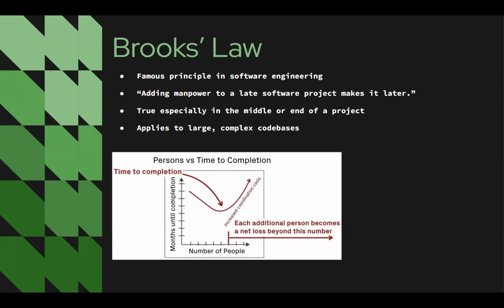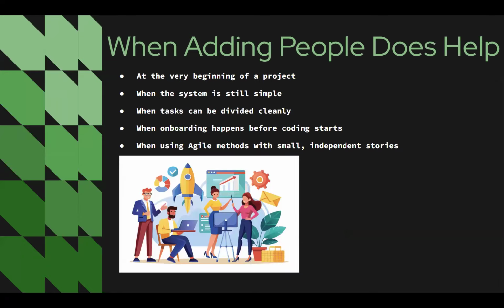So then the question becomes, is there a moment in time where adding people is actually beneficial? And the answer is yes. That is right at the beginning of a project. This is because the system is very simple, right? No coding has begun, so you can distribute the work evenly and everyone can contribute effectively. Since no code has been done, that means everyone is on the same page. No one has to catch up with someone else or train someone else. So everyone is growing together with the project.